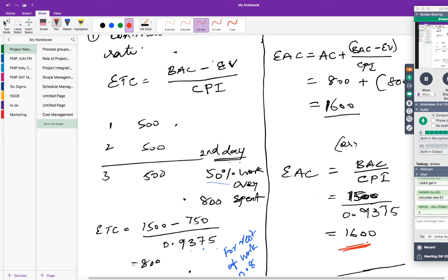So you go and ask your sponsor, sir, on the second day of work, I understand that I have spent $800. I should have spent only $750, but I have spent how much? $800. So if I go at the same rate, I can complete only in $1,600. So please give me another $100. Instead of 1,500, give me another $100. This is what you're asking your sponsor.